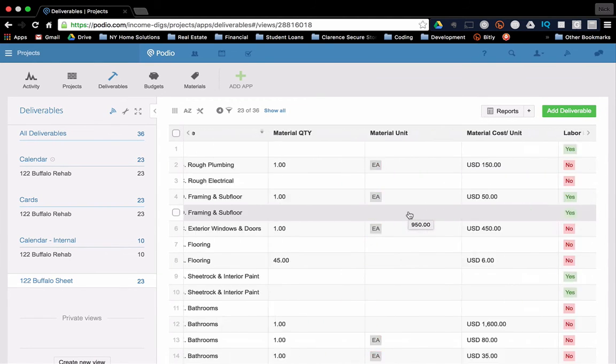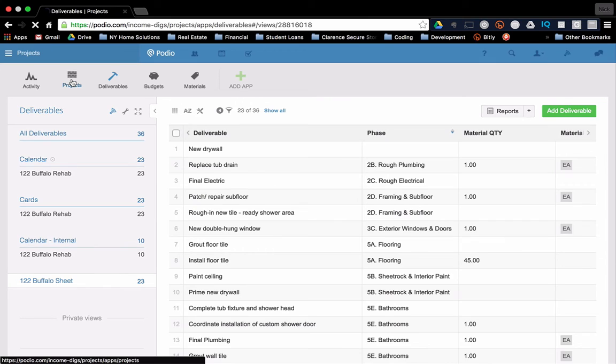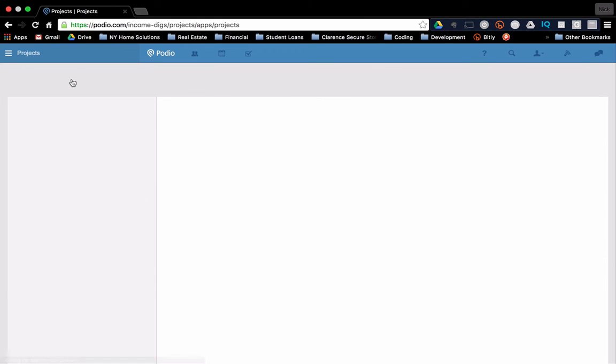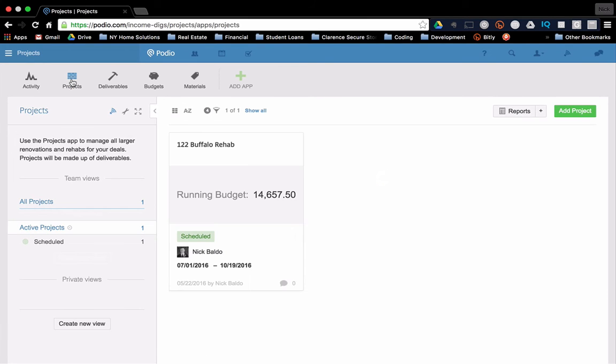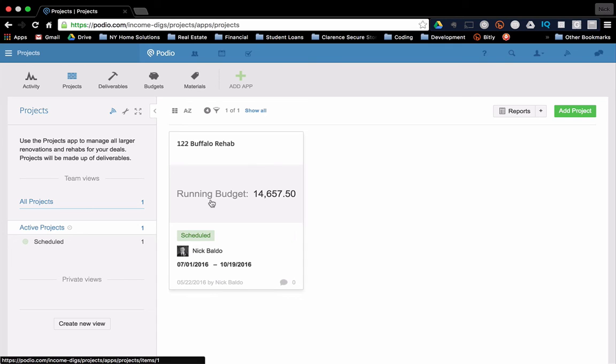And the coolest thing about that is that this goes up to the high level of the project. So I go back to my project. Here's the budget. All that is is a summation of all of those tasks that are related to that project. All right. And as I work through the project and things change, you saw that variance column. We'll track the variance of the project. How close am I to my budget? How far am I skewing from that?